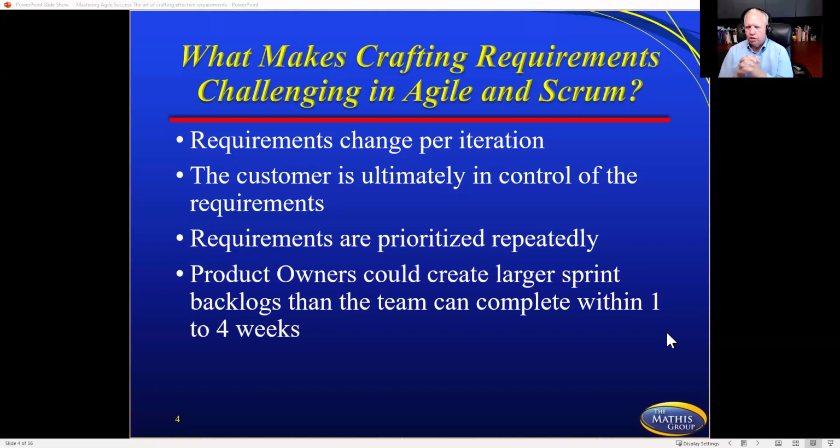That's the only chunk of control we have, is to be able to execute as fast as we can, knowing that for that 3 weeks, we're not going to have any change orders. If the customer is wanting something, then it's going to be changed in the next iteration, but not during that particular sprint. And so if any of you are running longer and longer sprints, you probably have noticed change orders are now starting to become an issue.